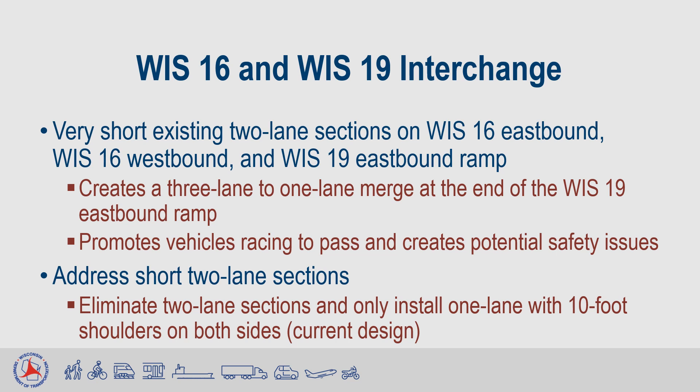At the Wisconsin 16 and Wisconsin 19 interchange, three different options were presented at the July Public Involvement Meeting to address the very short existing two-lane sections on Wisconsin 16 eastbound, Wisconsin 16 westbound, and the Wisconsin 19 eastbound ramp. Based on public input, option three — a reduction of the short two-lane sections to one lane with 10-foot shoulders on both sides — was selected.